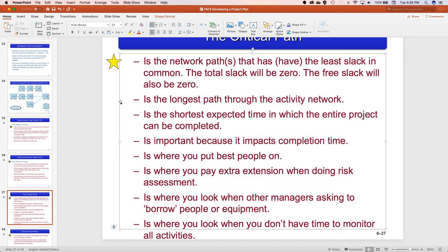All right. So in order for us to get from here to Orlando, we have to build a road that's not necessarily going to be the shortest path. As a matter of fact, it's probably going to be the long way around it because it's going to be less expensive for us to go around the swamp than go through the swamp. And I shouldn't say swamp, I should say Everglades, right? So to go through the glades. However, it's still the shortest expected time for us to complete the project. It is not the shortest path, but it's the shortest expected time for completion.